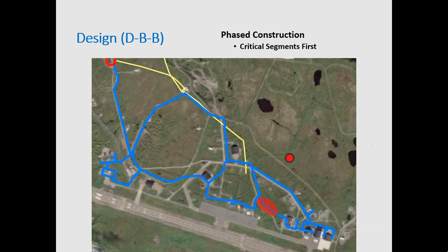That was the only stipulation we had on which one had to be constructed first. The remaining 9, we left it to the contractor. We made our recommendations, but we fully anticipate that they may say, "You know what, we're going to do this one first, our guys are ready to go from here to here, and we're going to do this one next." Fine, let's talk about it, but get this one done first so the water is looped, so it's not just being fed down this one that's not providing the water service correctly.